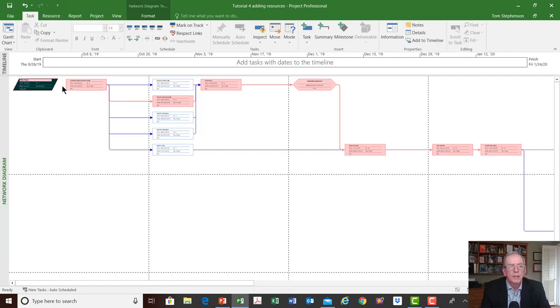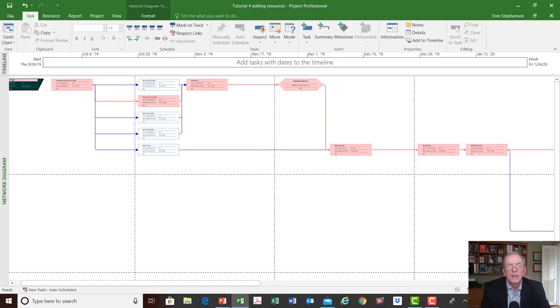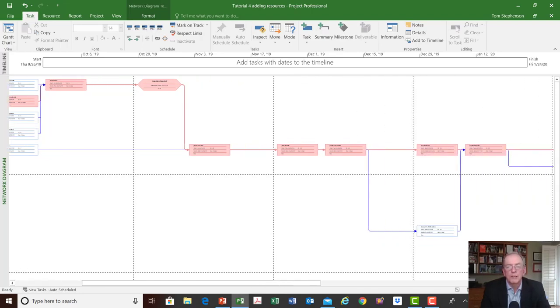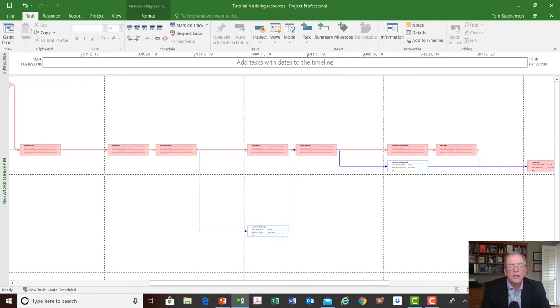We mentioned that the parallelogram is your summary task. It shouldn't be connected to anything, but your activities will all be connected. If they're not connected, it means that you're missing something. Best practice is to ensure that all the activities are connected in your project, so your critical path is actually correct. It doesn't mean it's correct though, just that. You've got to make sure you've got the activities correctly linked, the way you want to run your project.